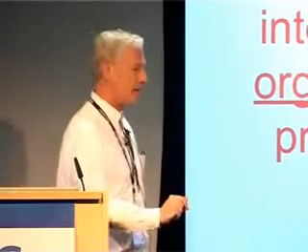I've talked about that. In Scrum, we have a Scrum Master. A very common problem in China and in India is that you don't get real Scrum Masters, you get fake Scrum Masters: project managers who are acting as Scrum Masters. As you probably know, a real Scrum Master has no authority over the team and can be fired by the team. The power relationship in real Scrum is that the Scrum Master is a servant to the team and can be fired by them. But in these fake Scrum Master environments in India and China, you often get project managers or team leaders acting as Scrum Masters, which you don't really want.